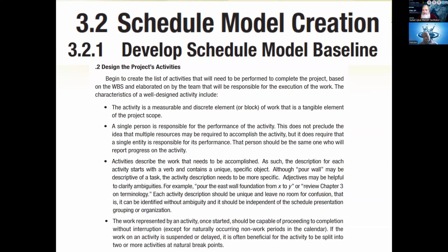You will declare 1A complete and move on to your next job until 1B is unsuspended, and then it has been inducted into the schedule. You will have to do it later. But you can't leave a work unreported, unfinished, and move on to another task. As I said, we will break it at the breaking point and split it into two. You got that? Yes, sir.